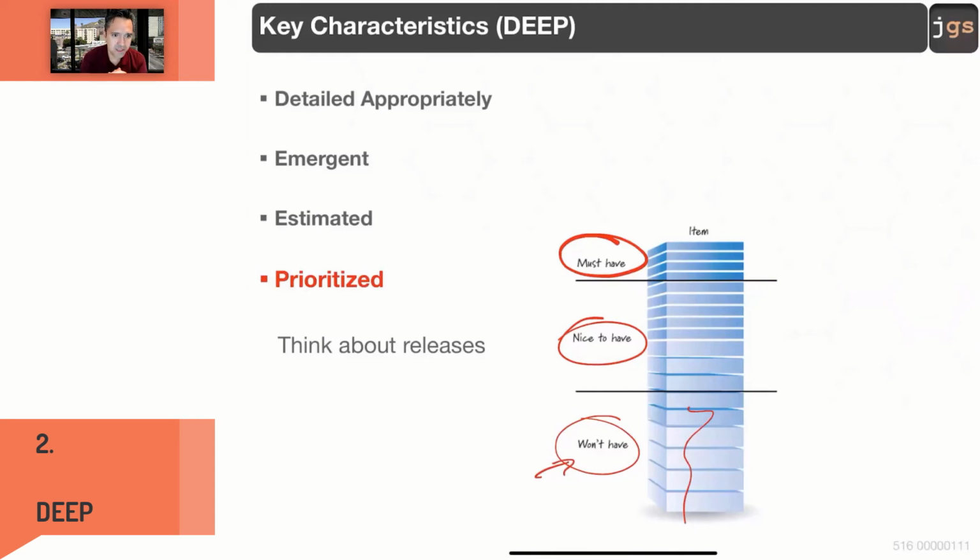I am assuming that setting up the database, even though it's a technical activity, probably is going to be priority 1 because everything else is around using the database, or at least priority 2. Having the database in a low priority could be a bad idea because you're not going to be able to showcase your project working, everything integrated.